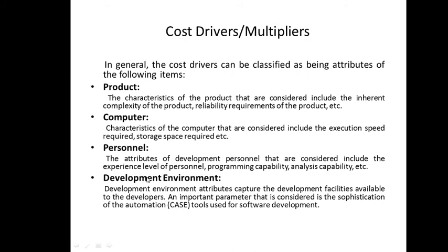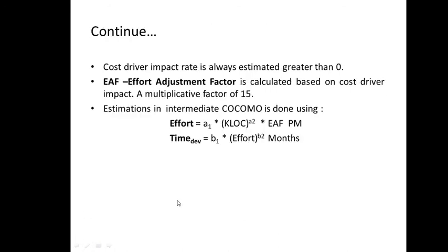Then the development environment. Development environment simply means, one way is you're doing the entire task of software development manually, each and every phase of SDLC. The other case could be if you're using automated tools, that is CASE tools. Remember, computer aided software engineering tools, we have tools for almost all the phases and non-phase related activities also. If you carry out the task with these tools, it can be done with less effort, less time and less cost. So these are a few factors, or cost drivers, which influence the estimations. Now numerically, what will be the change while you're considering this?